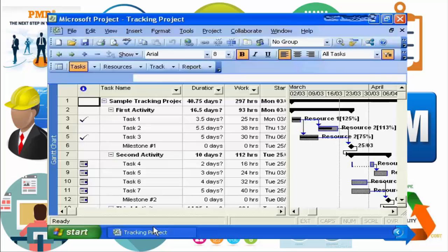Here we have a Microsoft Project plan that I've already created and that already has task tracking begun. You can see here in the Gantt view we have 3 tasks where there is a black bar going through the middle of our Gantt area. The black bar is indicative of time tracked. So we see this task is complete, the black bar is all the way through. Task number 2 is in process, the task bar does not complete to the end of the task, and task 3 is also complete.